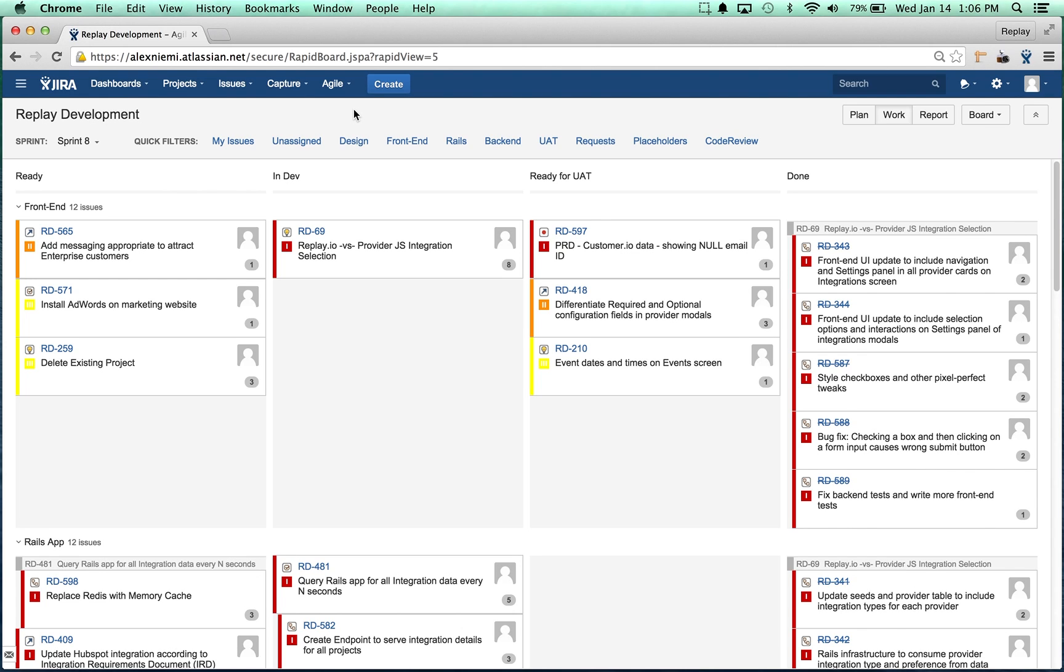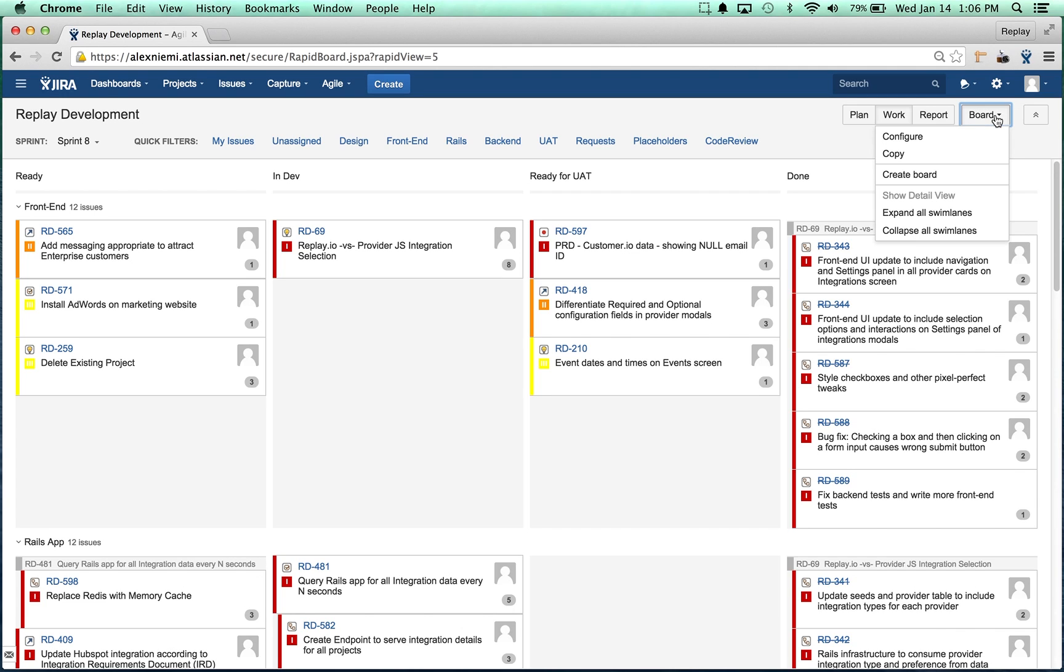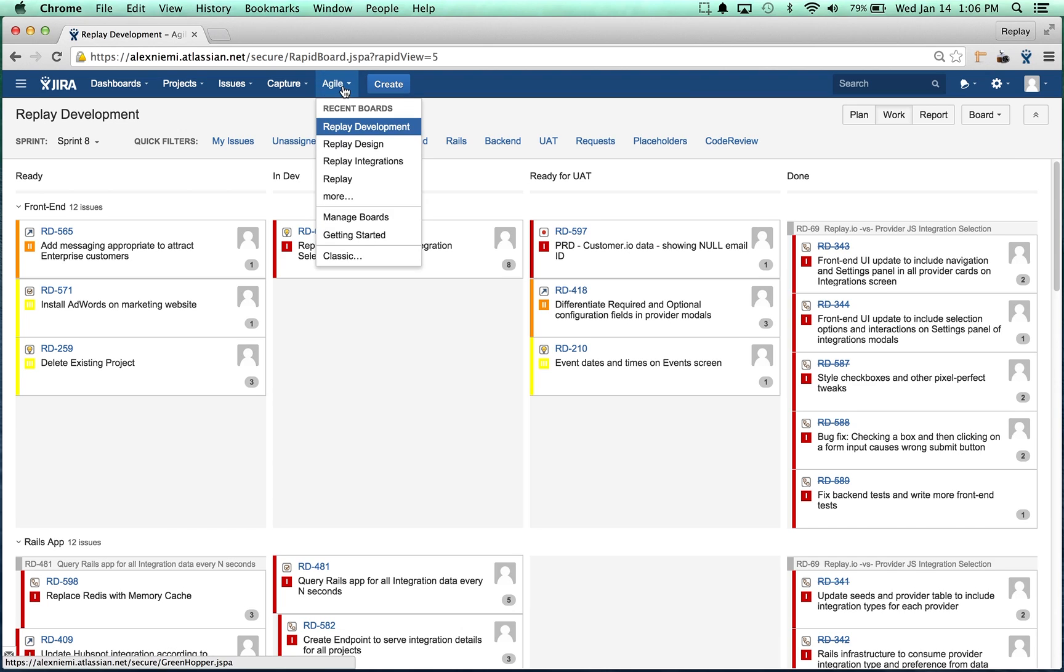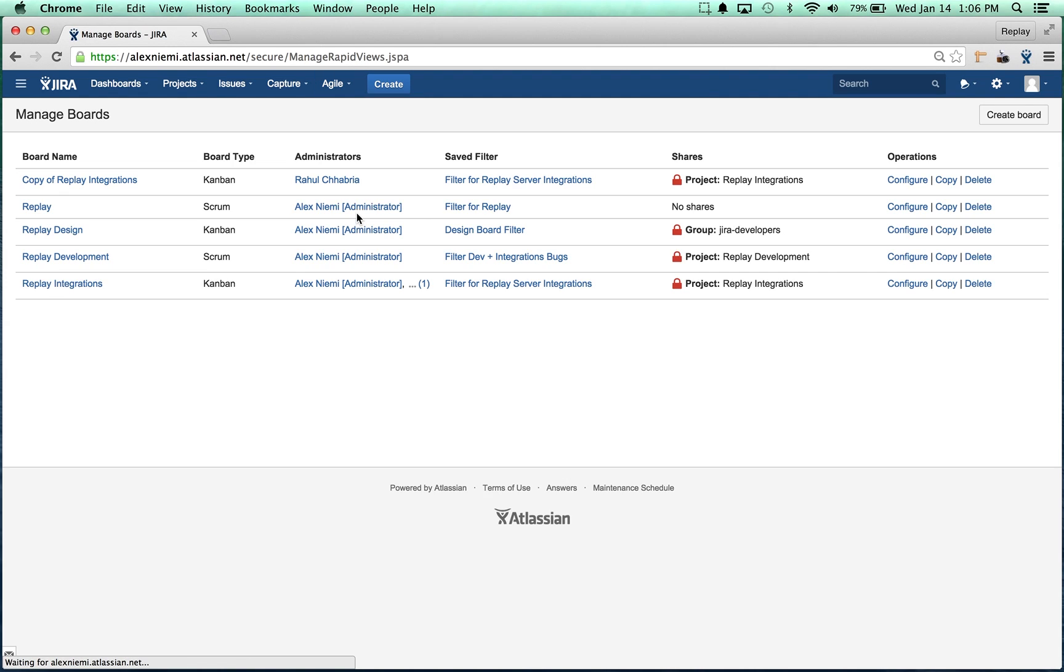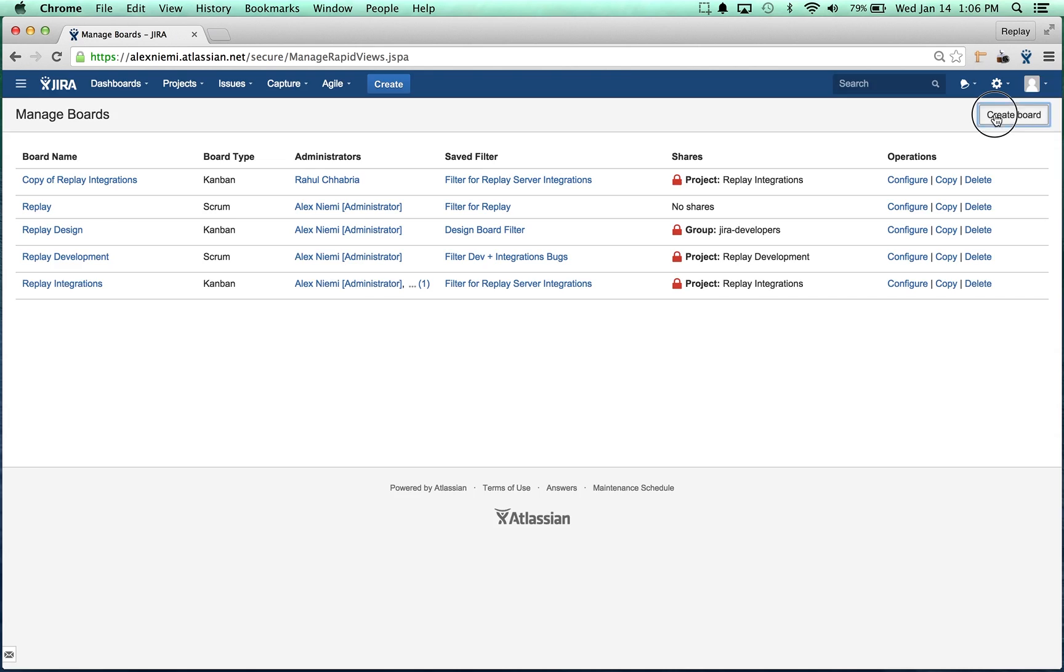We can either start here, go to board create board. Another way of doing it is to go to the Agile drop-down and click on manage boards. We're going to do it that way because I like to be able to see all of the different boards that I have. Then up in the right we have a button for create board.